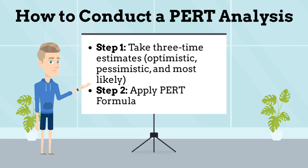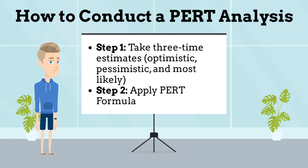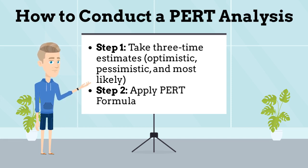How do you conduct a PERT analysis? There are two main steps associated with conducting a PERT analysis. Step 1, you need to take three time estimates for every task along the critical path. These three estimates are based on optimistic, pessimistic, and most likely time to complete the task.